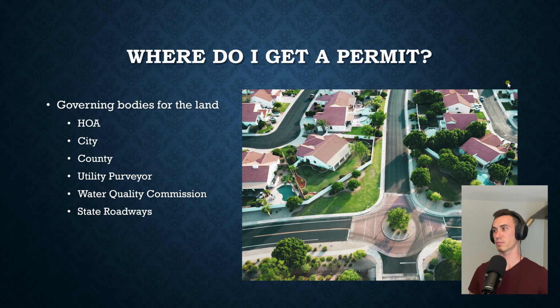Okay. So permits are just the name of the game. If you're going to be building a house or building a structure of any kind, and you plan on not living forever and owning it forever, it's going to have to be sold at some point. And so you should just be aware that if you're going to participate in the game, you should play the game properly. So get your permits where you need to. You're either going to source them from small jurisdictions like the HOA for your neighborhood, all the way to your city, your county, your utility purveyors for developers. If they're going to tap into mains and stuff like that, they've got to get permits for that.